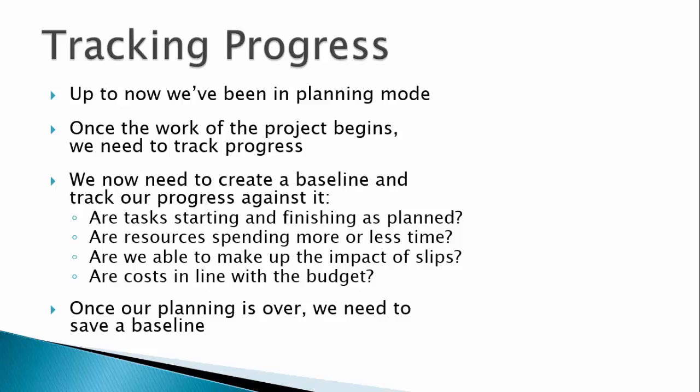We are now ready to leave planning mode and start the work of the project. By creating a baseline of our plan and tracking progress against it, we can answer questions such as, are resources starting and finishing their assignments as planned? Are resources spending more or less time than they estimated?